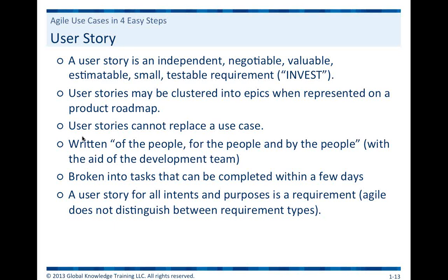So as a client care agent, I need to have access to all the transactions that my client has had across all of our lines of business, so that when they call in, I can service them more easily and more quickly and find out their issue and resolve their issue within a timely manner. So that might be a user story.